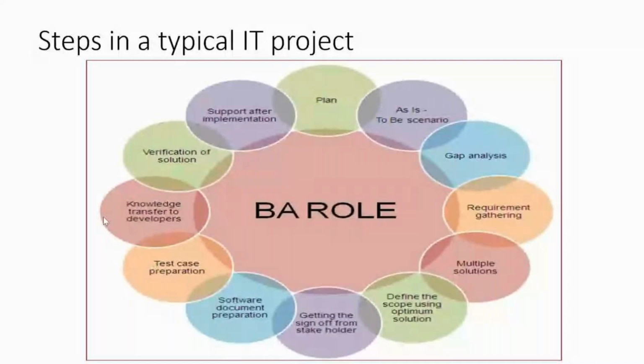What is different is Agile introduces the iterative cycles. So you don't spend a major chunk of the initial part of your project on requirements itself. Rather, you break those requirements into smaller chunks and focus on developing, testing, releasing that small change. Then focus on the next set of changes, develop, test, and release, and so on and so forth. Okay, but the sequence still remains the same. And in your role as an IT BA, you need to be dynamic. Your insights help in taking the project forward, bridging the business aspirations with the technical possibilities.